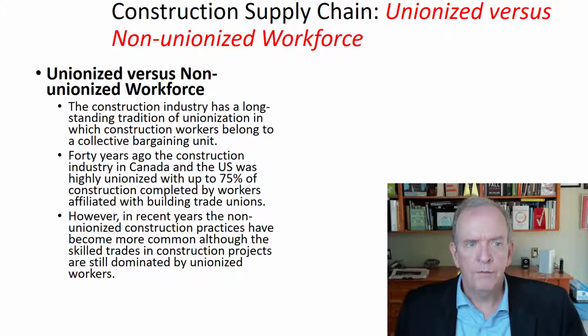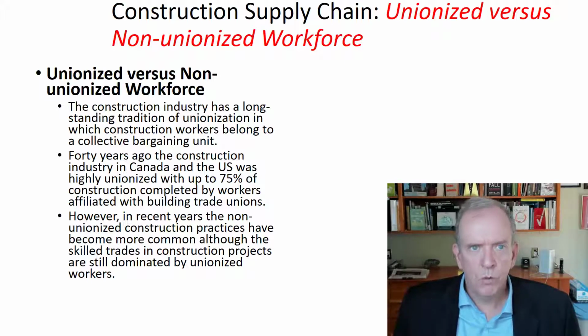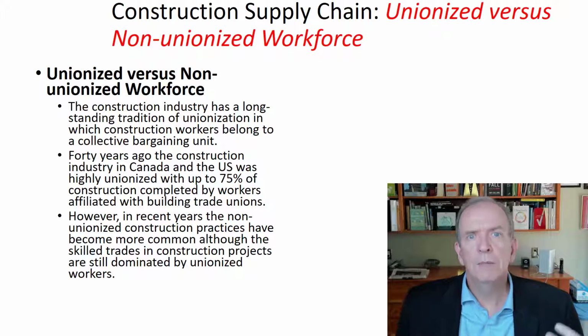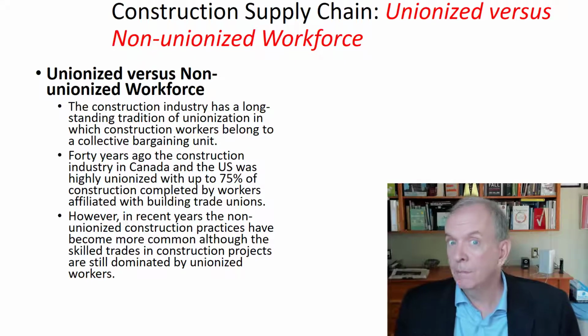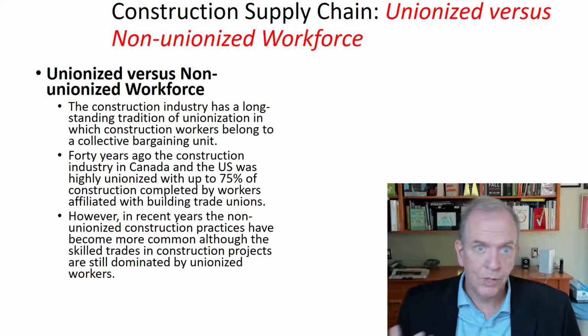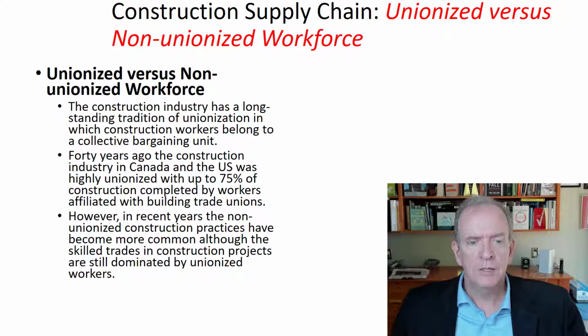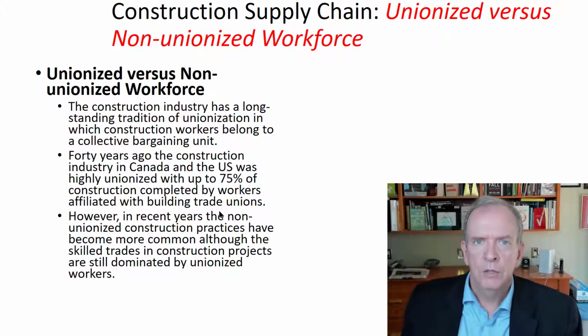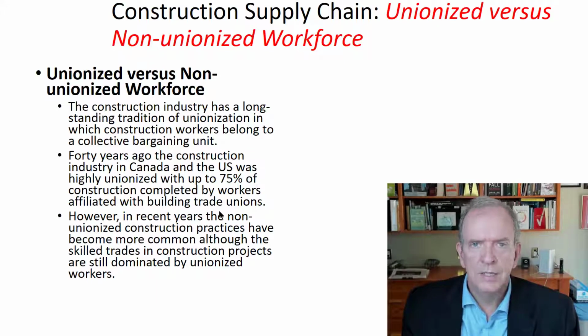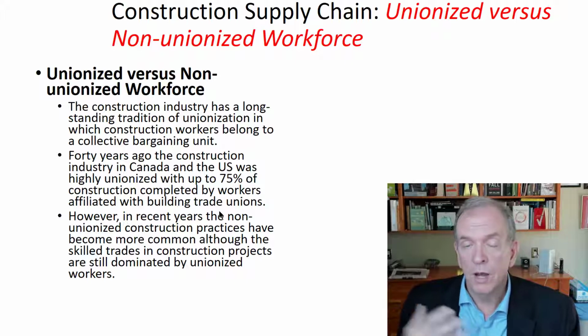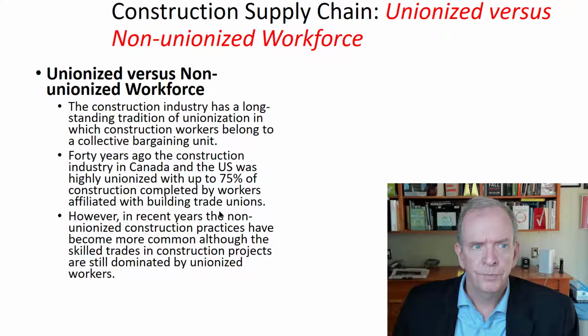So you have to learn what the union requirements are, what the hiring requirements are. You have to learn what the limits and restrictions are, what the union pay rates are for overtime and premium time. Those are all constraints that you learn to work within. Overall in Canada, it's around 30%, according to the latest statistics, that is unionized work. A lot of that's government work as well.